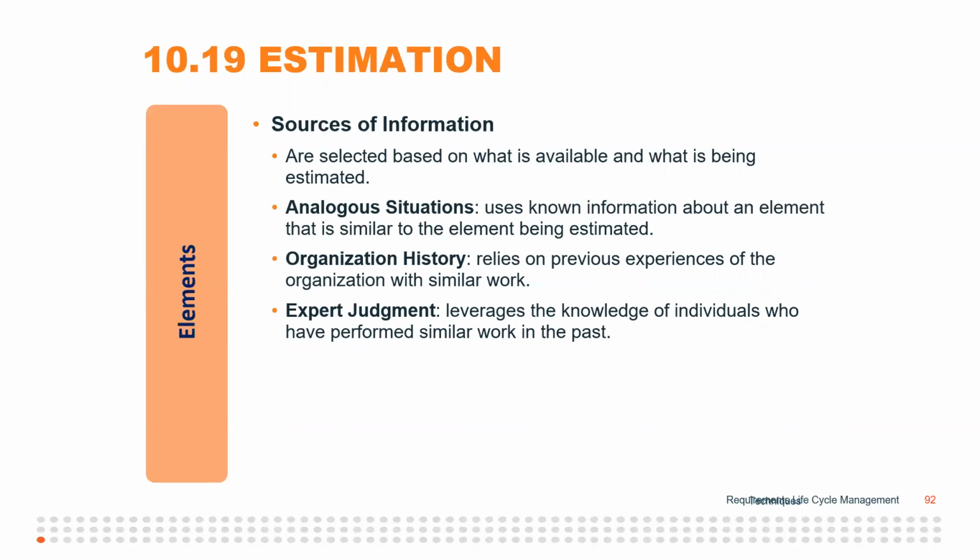So, an analogous situation could be something like you're trying to estimate how much it's going to cost to implement a new module of Oracle e-business suite, and in the past, you've compiled a history of costs of what it cost you to implement other modules.